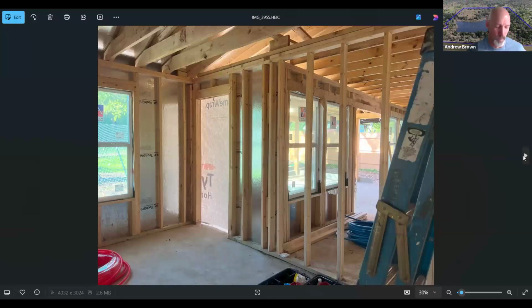So what Linda just called out was a huge tip and cost saving thing that just kind of got glossed over. When we're doing a shower, there's designing it for aesthetics and to make it perfect from a design standpoint. And then there's a cost part as well. For example, getting a 2 foot or a 3 foot section of glass, say 24, 30, or 36 inches, you can get those. They're all prefab, mass produced. That's easy. But if you need one that's 33 inches, now you're talking custom, and custom's expensive and takes time.